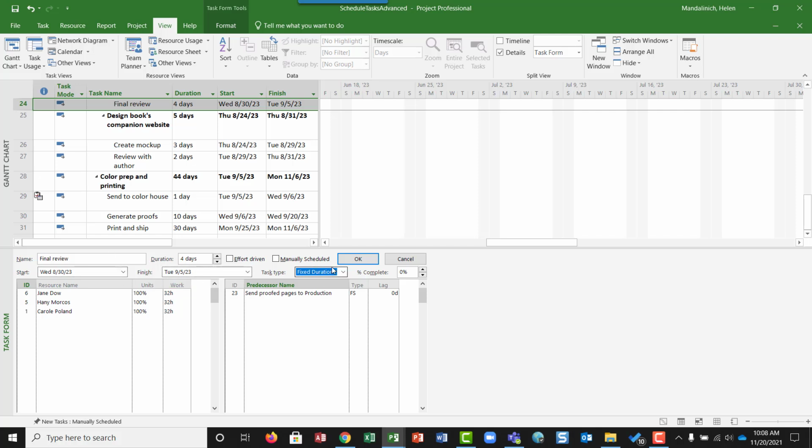Final review, fixed duration, and then this is going to be 120 hours. So we're doing fixed 120 hours. And then the duration doesn't change, but the work increased, right? So we can see that there.